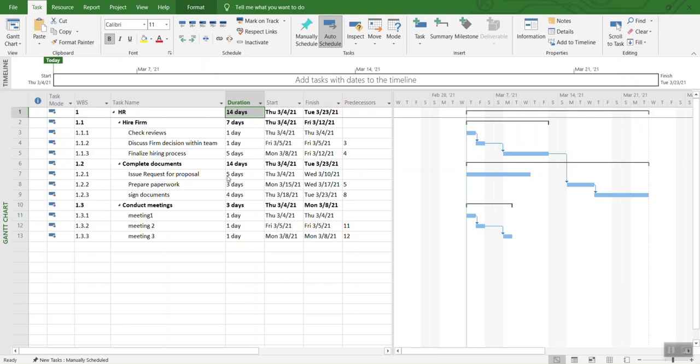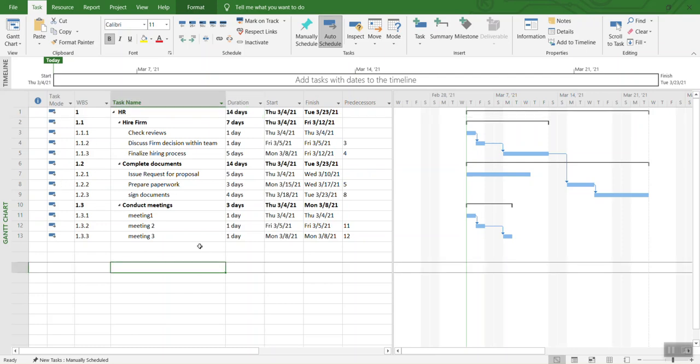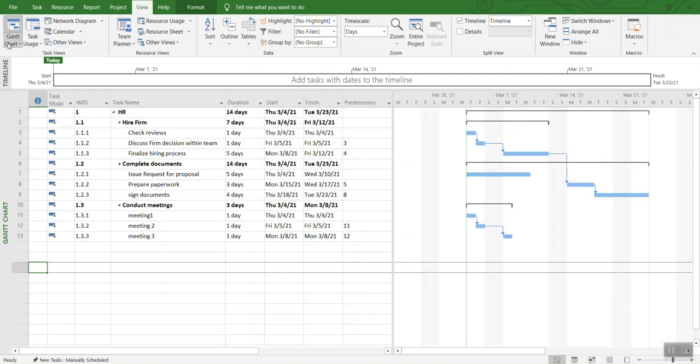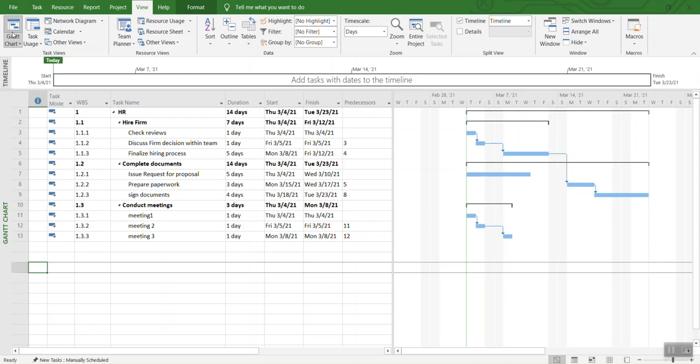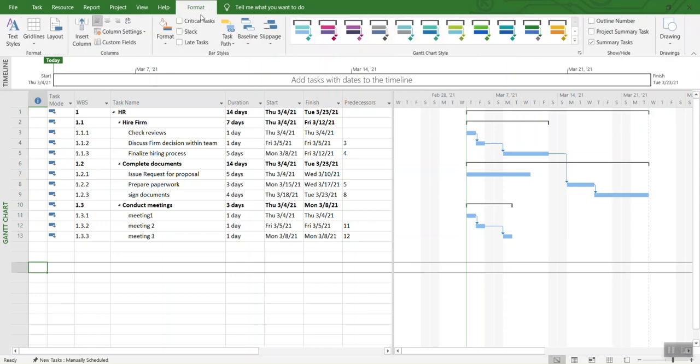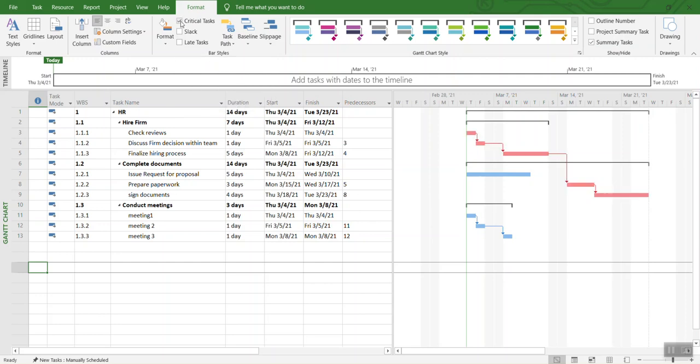What you're going to do is first select View and make sure you have selected the Gantt chart view, which is already selected and is the first option on the upper left-hand side corner. Once you do that, select Format. In Format we have the checkbox for critical tasks. Check that box and now we can see our critical path.